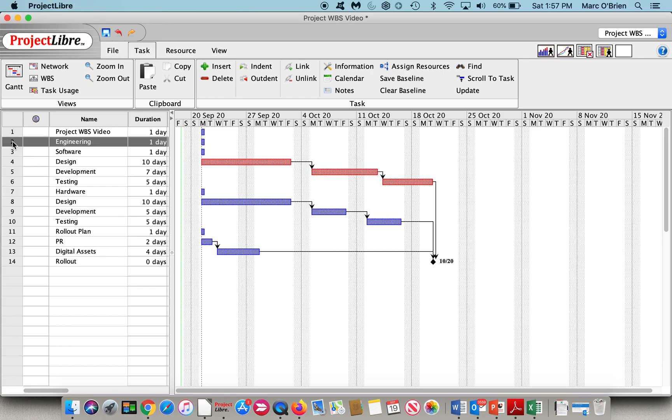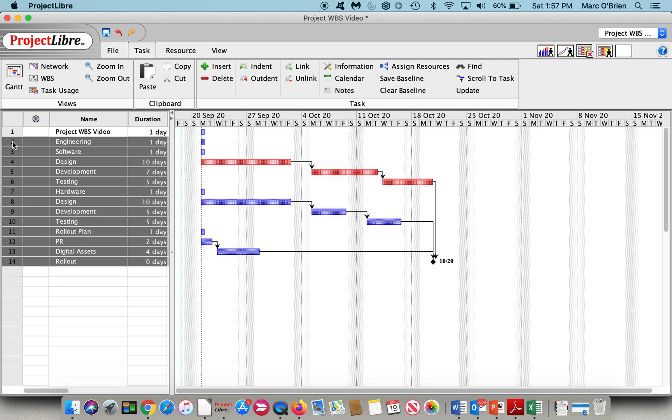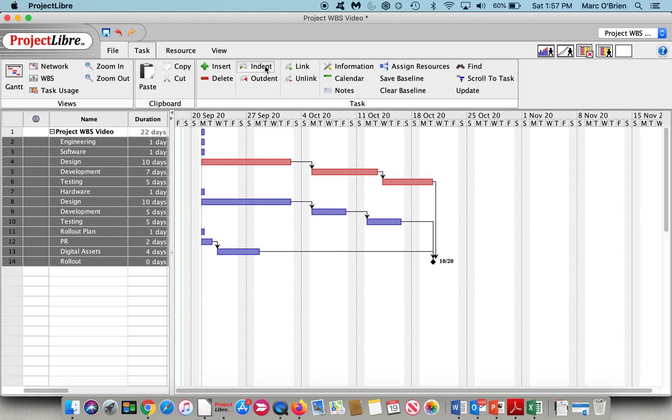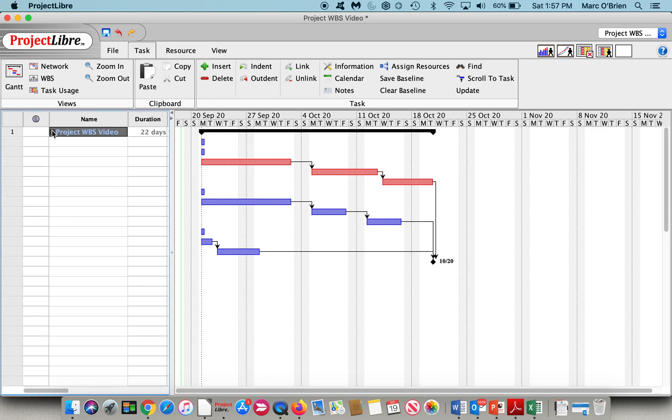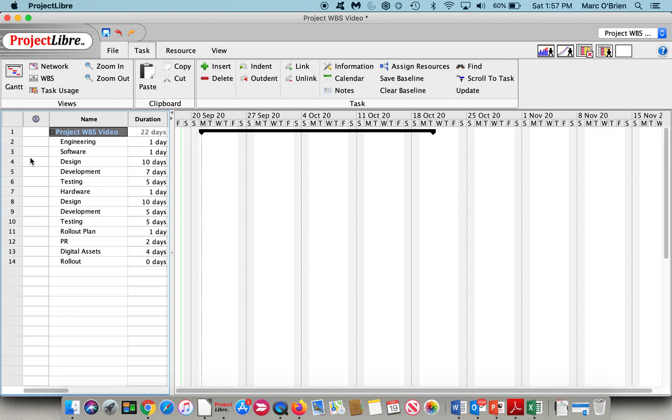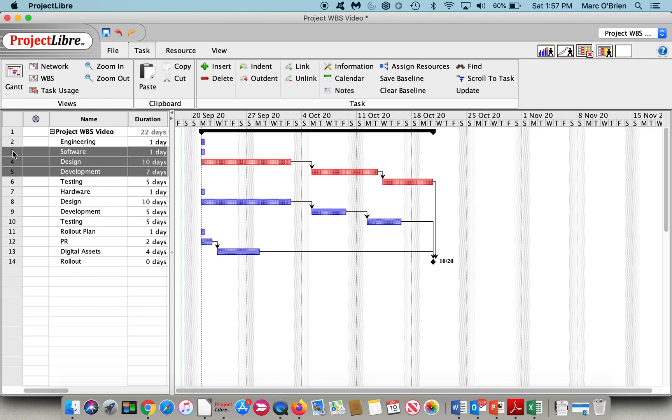What I'll do now is I will highlight a series of tasks, and I'll highlight all of them under the project summary task, and I'll click on indent. When I do that, you can see a summary bar has been established, and if I summarize that, you can see that it collapses. If I bring that back out, I've got another series of summary tasks I will do.